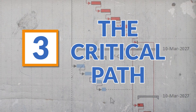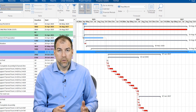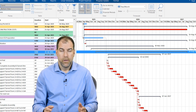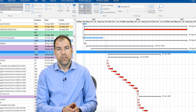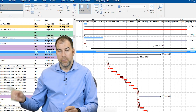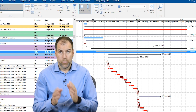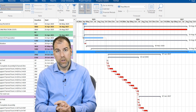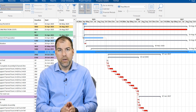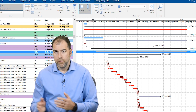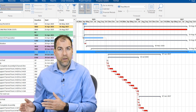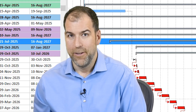In this schedule all the red activities are critical, and that defines the critical path — the most important path through the project that leads to the finish. Red activities are ones we really care about in construction, because if any of those are late, the project is probably going to finish late and there's going to be hell to pay.